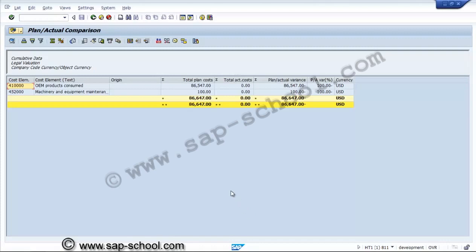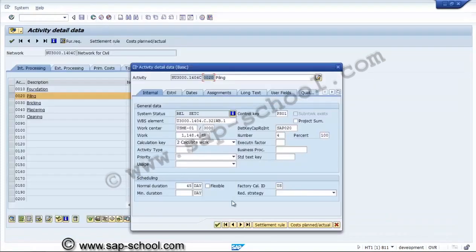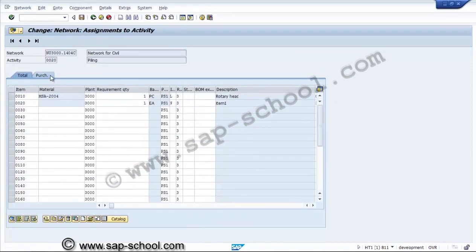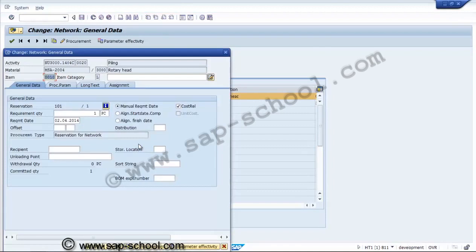We can see the total plant cost for the material and service. So here we'll go to the material component overview, and for the first material, because this is a stockable item, we'll see the details for this material. It has a reservation number. Why? Because the activity for which this material is assigned has been released, so it got a reservation number, that is 101 reservation. Committed quantity is 1, withdrawal is 0, and procurement parameters,